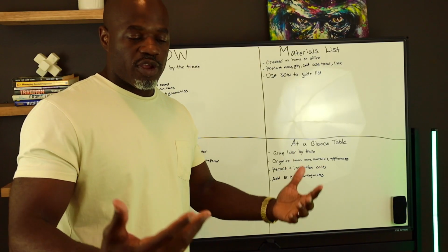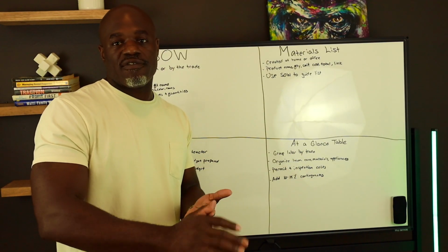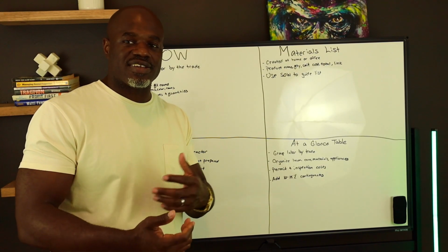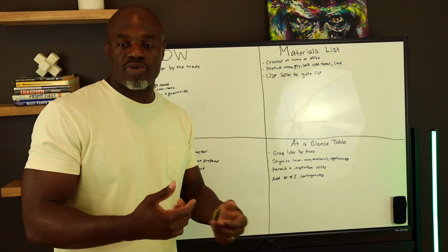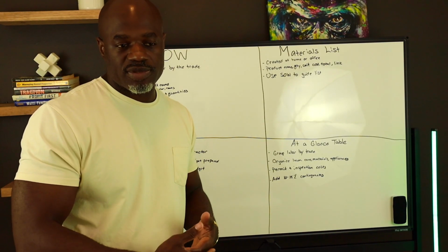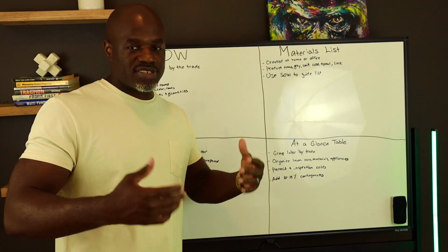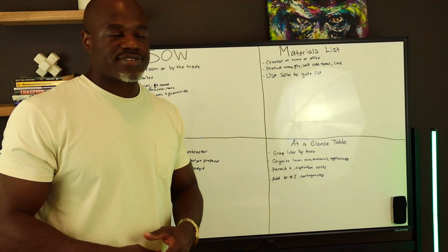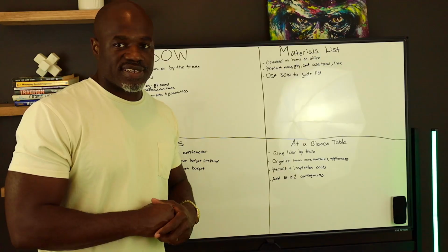For your hardwood floors, even though you're not running flooring over it, you still need to know how much square footage you're dealing with, because now that's going to be your labor. How much are the contractors charging to refinish 1,000 square feet of hardwoods? So you want to just document the sizes, the measurements, the quantities, so that your scope of work and your materials list can be thorough.